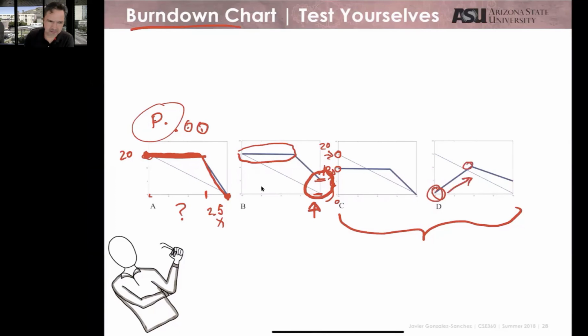If in day 0, I have 5 activities to do, why in day 10 do I need to do 10? Why is the number of activities increasing instead of decreasing? You do not modify the sprint backlog in the middle of the sprint. You take activities from the sprint backlog and complete them. But increasing the activities is something that does not happen in the sprint. If you need to do more because you found bugs or something, you put that in your backlog for the next sprint, not for the current one. That is important.